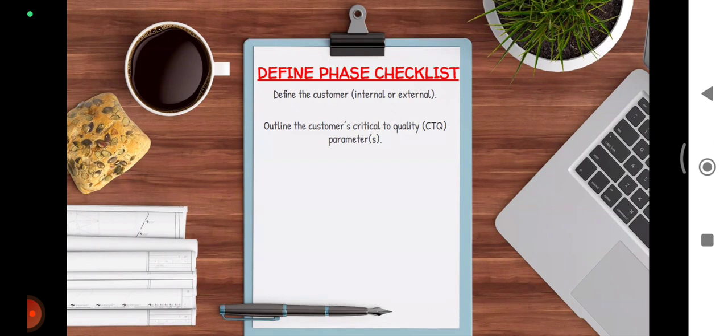You have to focus on the process that is going on. And then number 3, you have to develop a business case. That means determine what exactly is the problem. And in this case study that I've given you, the problem was that 40% of their credit card and loan offers were being delivered late, which resulted in what? In a $28 million loss.